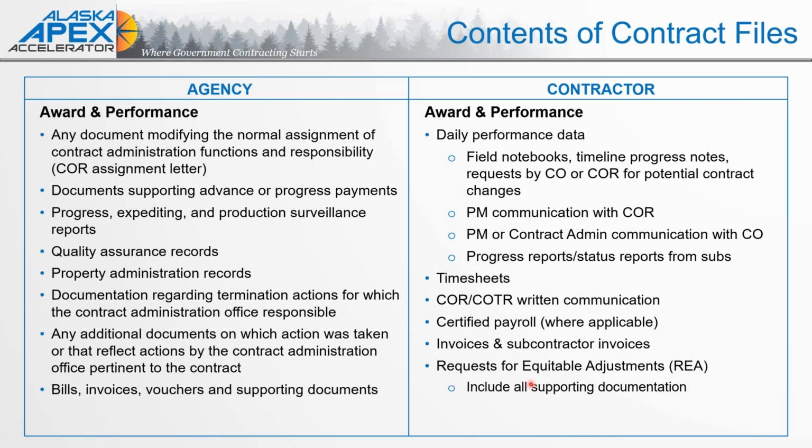If you don't have this documentation to support all of that, who you talk to, the requests, if it was a verbal request, was it followed up with an email? That proof matters, because enough time could have passed that the individual who requested it, your COR, is no longer even working for that agency. And now your proof of that being a valid cost is diminishing rapidly.